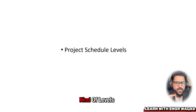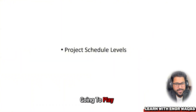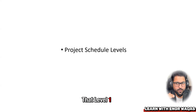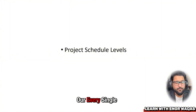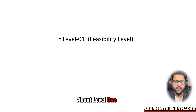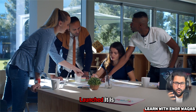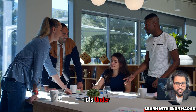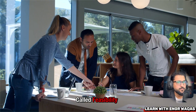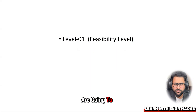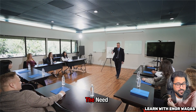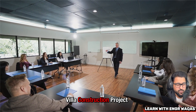Just remember this terminology: project schedule levels. Whenever there is a project, there are different kinds of levels. Think of it like a mobile game — you cross level one, level two, level three, level four. The same thing happens in projects. Level one is when your project is launched, under consideration, or under study — that is called feasibility.